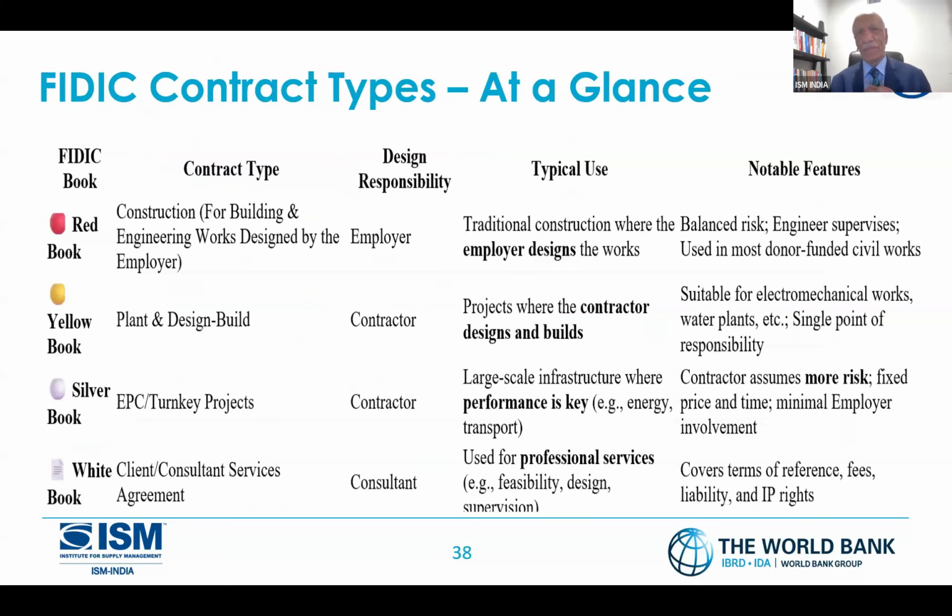So when we talk of the Red Book, I'll give you a few highlights on this. When we do the full-fledged program, we'll be spending a lot of time on each one of them. The Red Book is the very first one of FIDIC. Construction for building and engineering. Design responsibility lies with the employer. That means the person who is like a buyer, if you want to say it that way. The government is doing it, so we use the word employer. So the construction part is done by the contractor, and the design part is done by the employer. But it is typically used for traditional construction, where the employer designs the works.